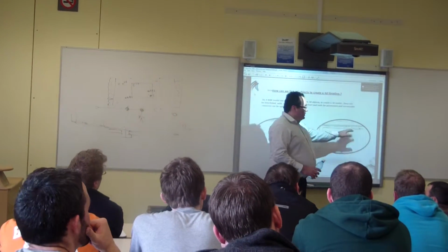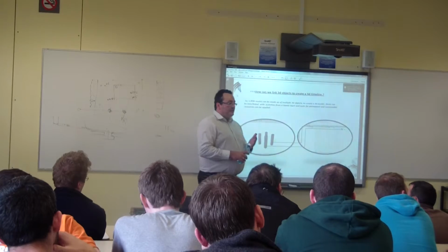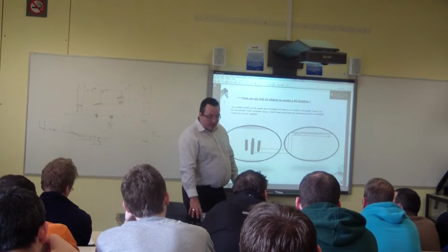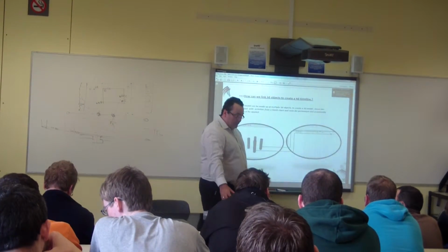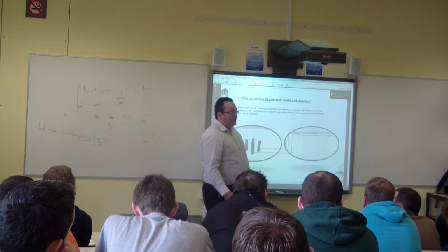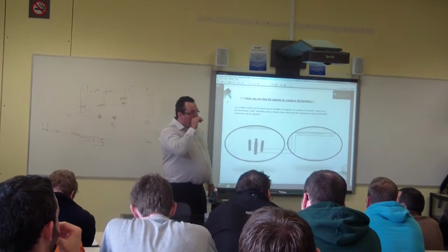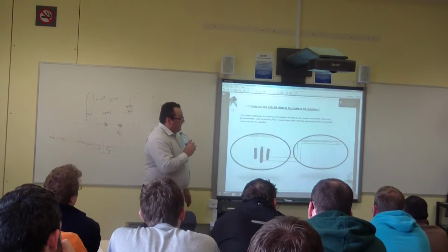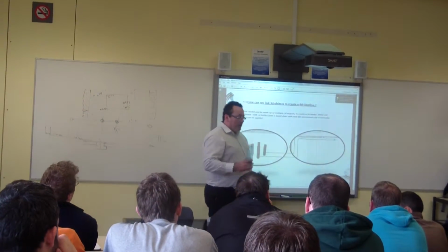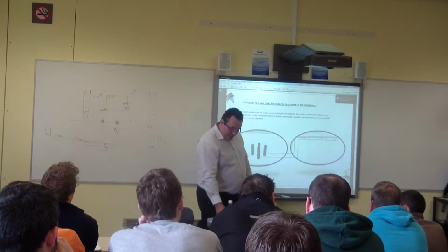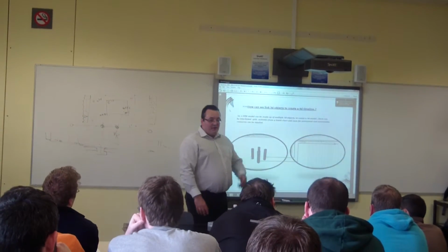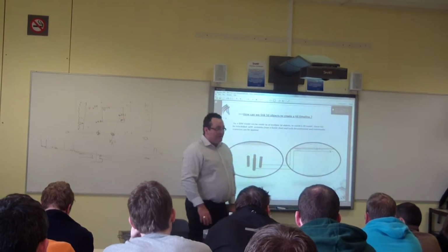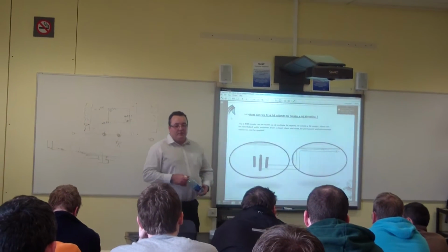Basically, whatever you planned in your tender, whatever you tendered for. Because when you do estimating, traditionally, an estimator sat in his own office and a planner sat in another office, and they both got different production rates. Now, costing software does get over that. But when it goes to site, normally what happens as well is when it comes out of the estimating office, it goes to the project manager, and he goes, "Oh, thanks very much. Right, so I've got a program now, reduce that, and change that, and do this and do that." So that's what usually happens.